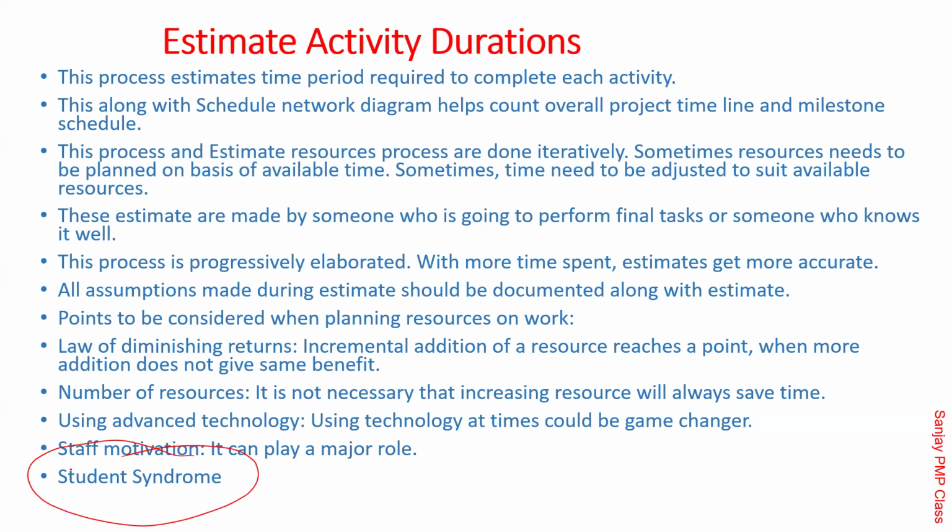That's the advantage of that. Now, can you have unit tests in your project? How does that translate? Interim milestones, yes, Raj. Create interim milestones for the final go-live date. It will see to it that student syndrome is avoided.